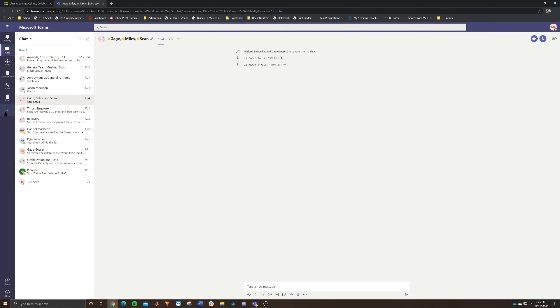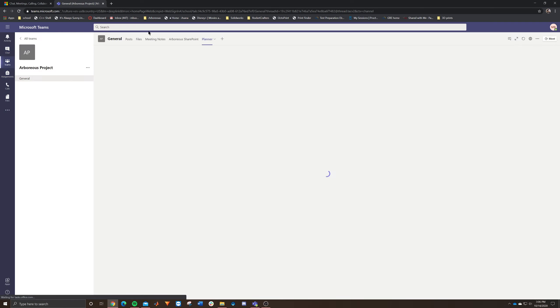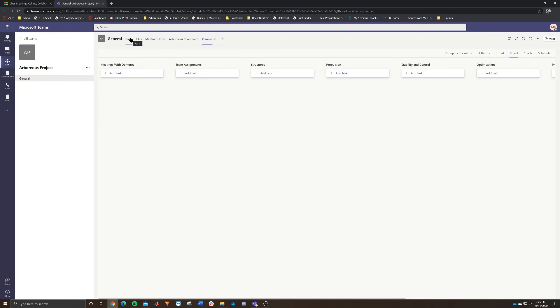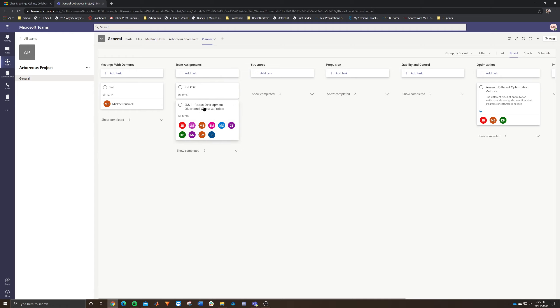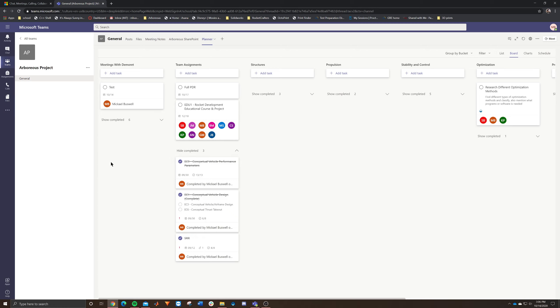So that, I think, is a decent overview. I mean, it's kind of fast, but it's pretty simple. Planner is kind of a cool tool that we've been trying to figure out how to use, but it works really well so far. And we've been tying it in with our work breakdown structure. So essentially the codes and everything that you see, like EC 19, EC 1, those are all from the work breakdown structure. And those are adapted to this.